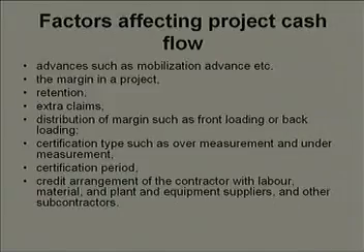Now, the project cash flow gets affected by many parameters. For example, if the contract has a provision for advances such as mobilization advance, it could be a plant and equipment advance, it could be a secured advance, which is nothing but the advance given for procuring the material.